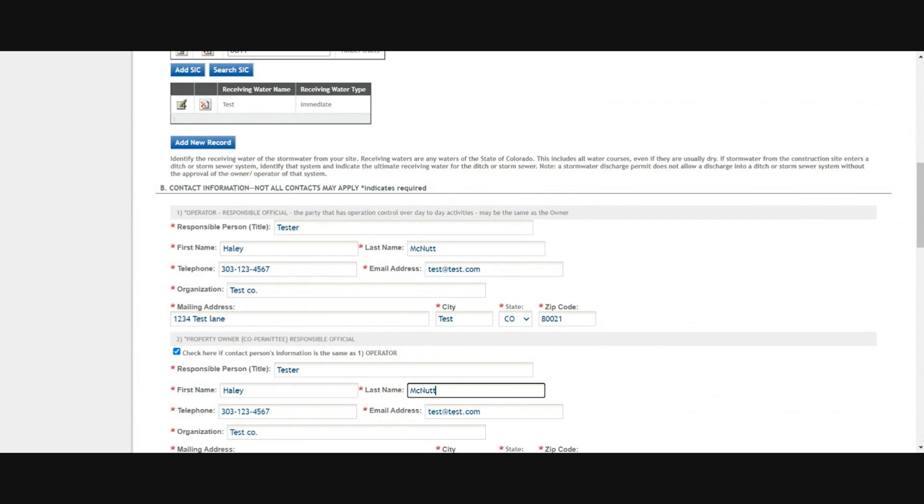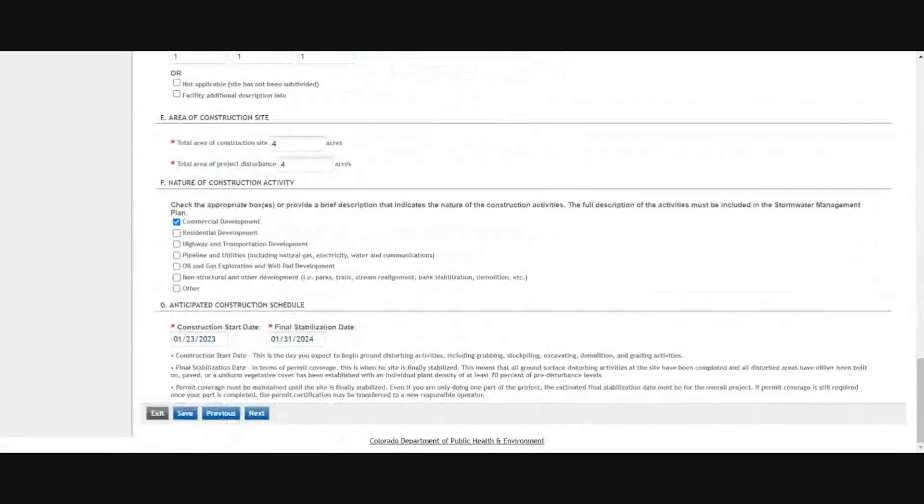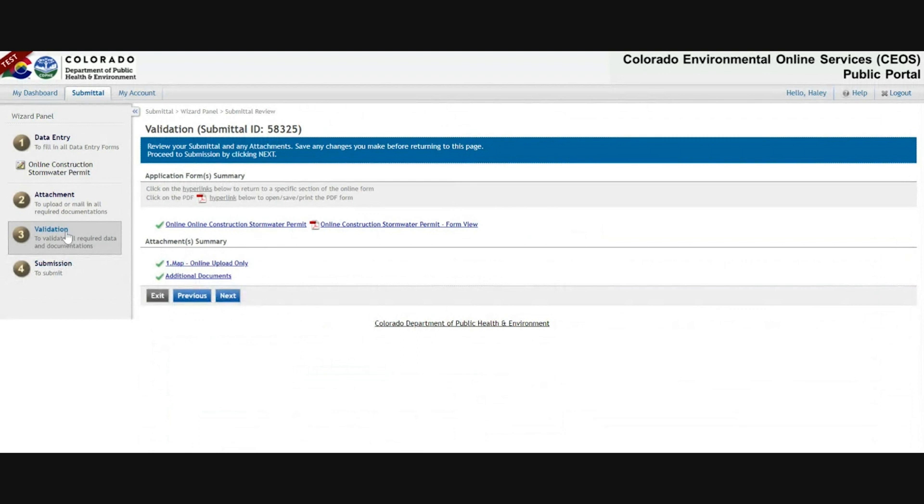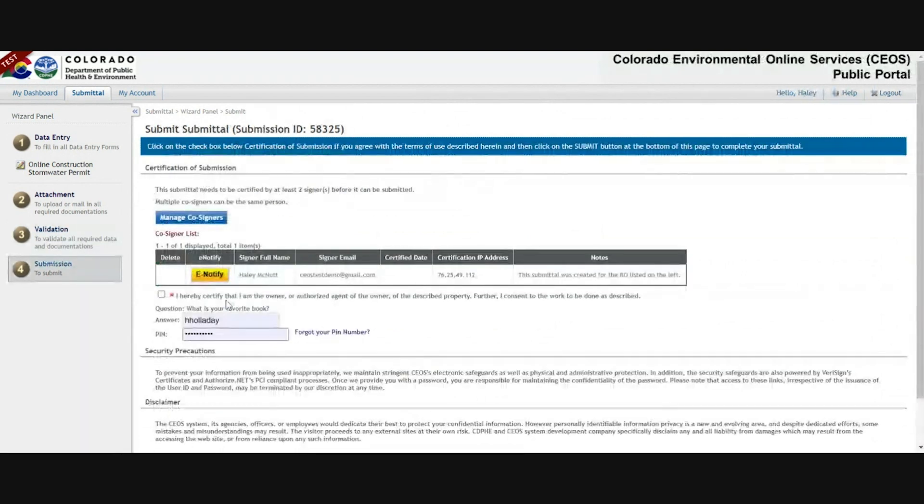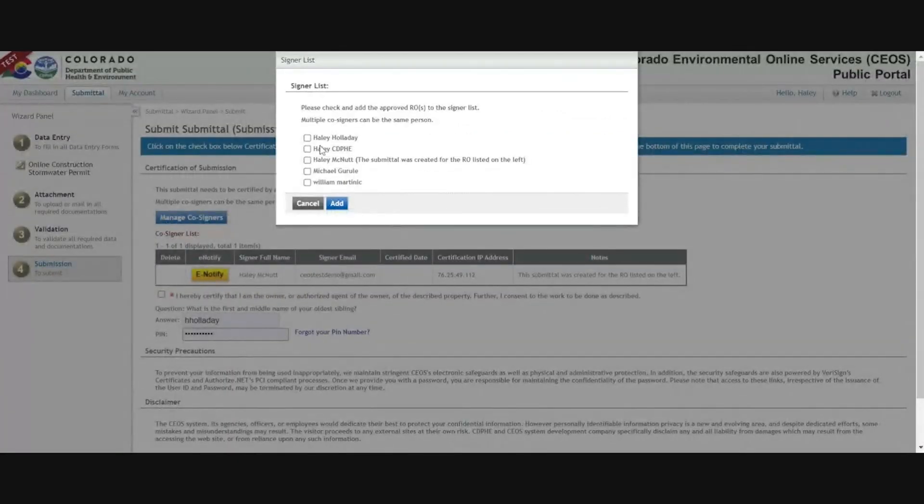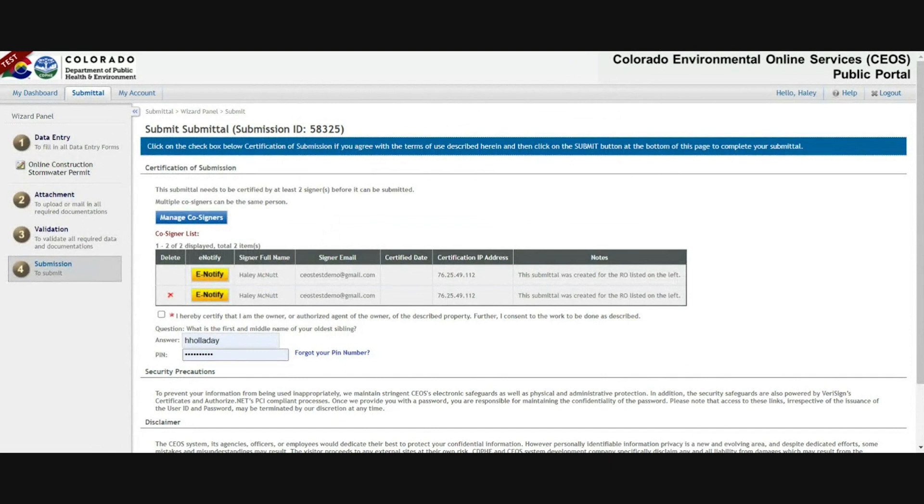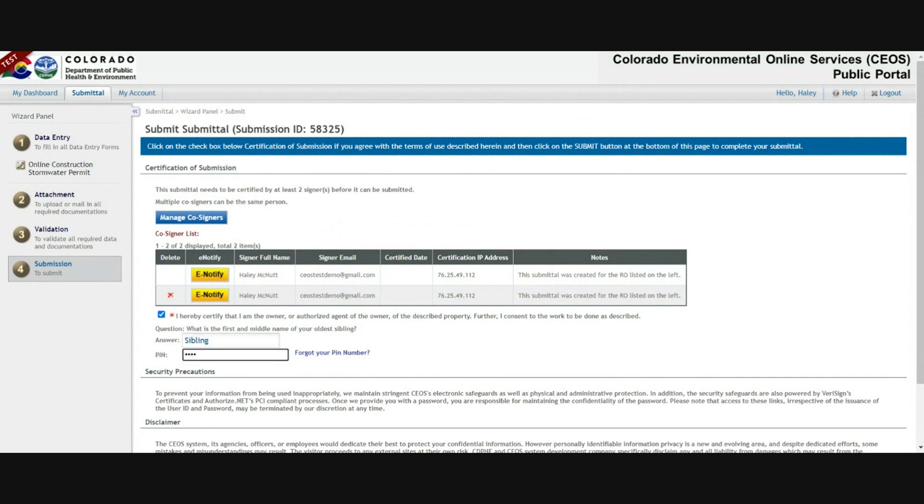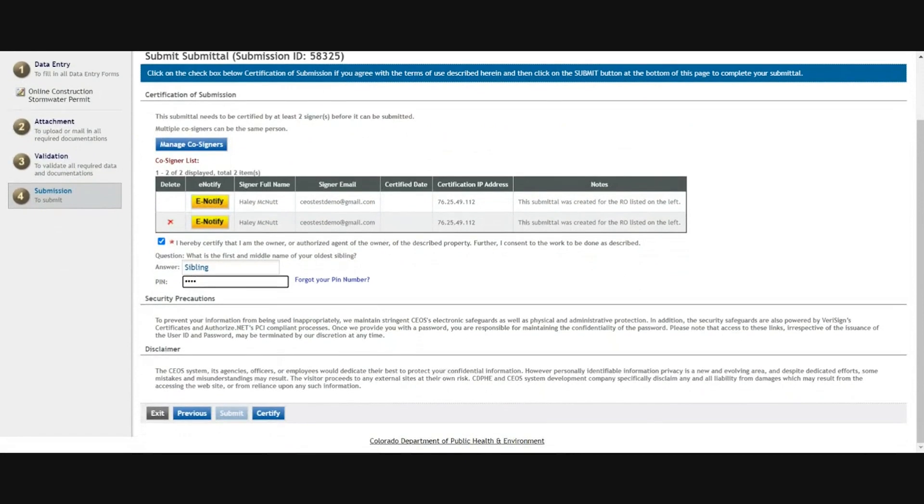If they are different people, both will need a COS RO account and will need to be associated with this facility. Save that change and then either click next or navigate using that left-hand panel. Since on this application I am the owner and the operator, I'll want to select my own name because you'll need two signatures on a stormwater permit application. Then answer the security question and your PIN, check that I hereby certify that I am box, and click certify.